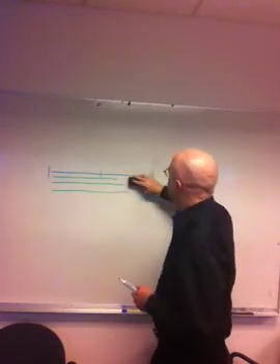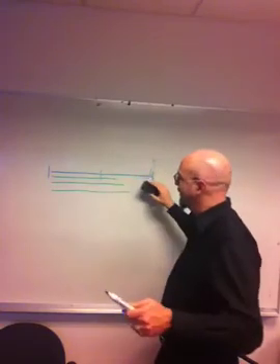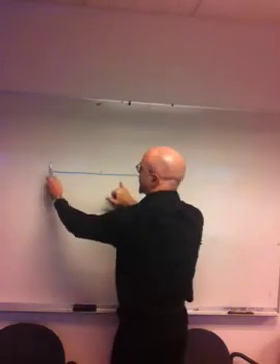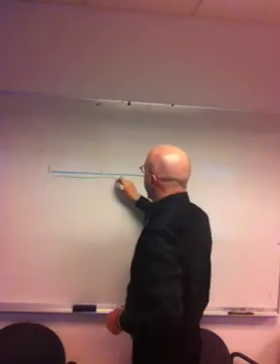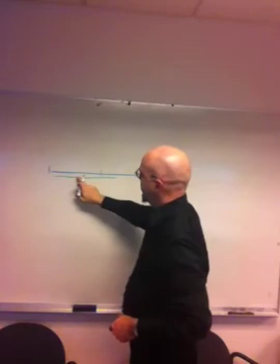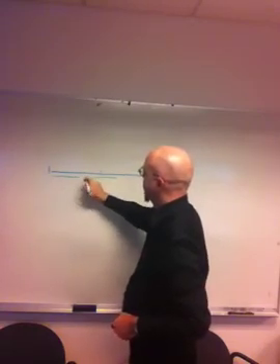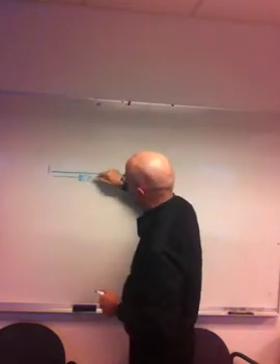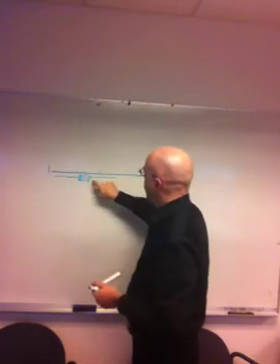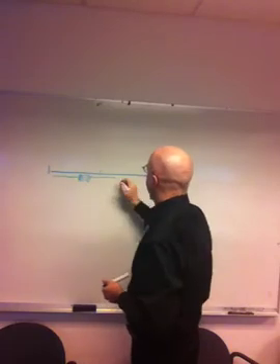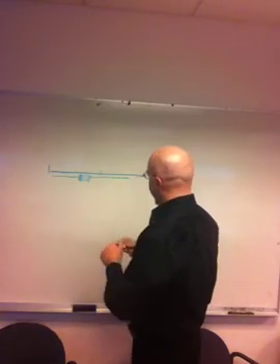This poor QA person, look at this. Okay, get rid of that. This is the bad approach. Now, we take this same story that was this long, right? It was this long. And I break it up, and I make it a quarter of a sprint. And I give it to QA here for them to do their QA testing. And then I get it back, and okay, that much work has to be tacked onto the end here. But then QA can do here.